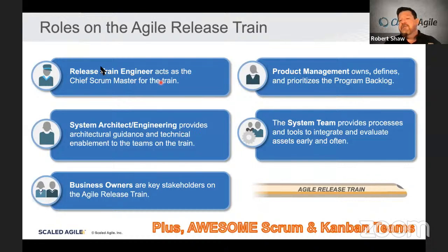Sometimes also identifying where there are opportunities to lay down architectural runway ahead of the teams, right? So if an organization with a large product has a large initiative coming up, sometimes that may need to lay down some foundational stuff so the team can continue to build on top of it, right? So kind of a guidance, oversight, directional view, as well as responsible for identifying architectural runway down the road for some larger objectives coming up and how to implement it, right?